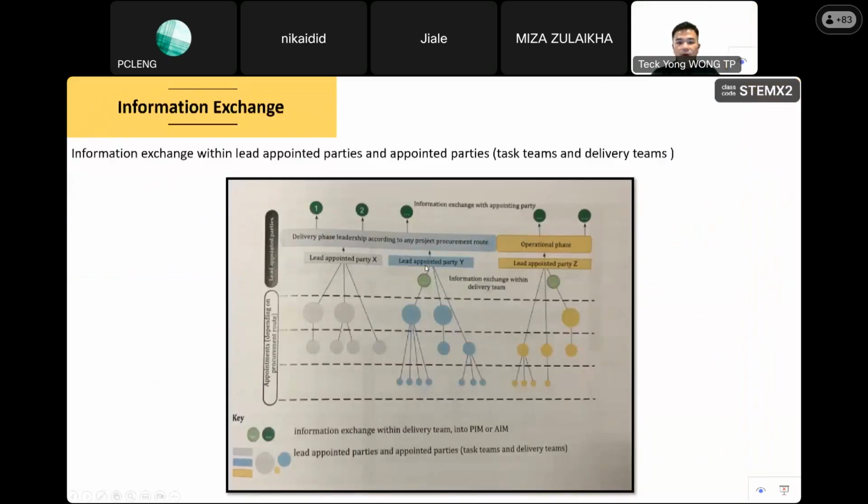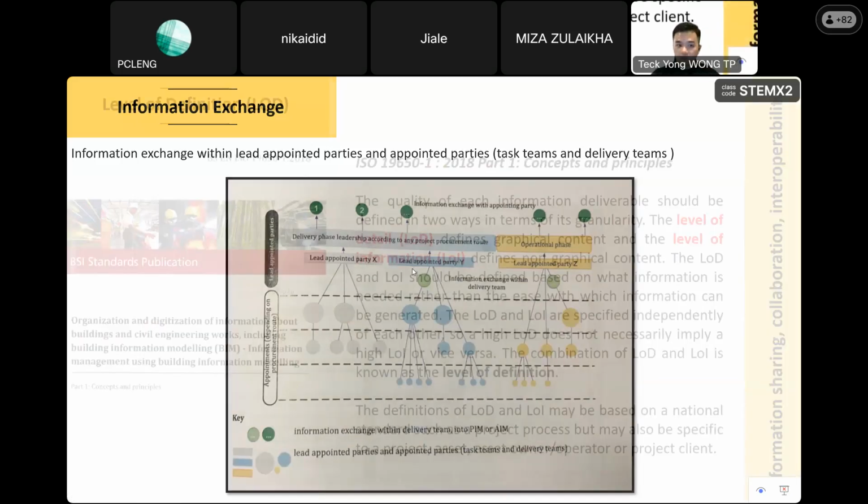So I have appointed already. So when something happens, I know who to find. I link to where. So the architect is under who? Who gets your money? Below the architect, who is there? Did the architect hire a landscape architect or not? If you hire the landscape architect, what should you write in your contract? You cannot say you are the employer to the landscape architect. So the landscape architect did something wrong. Is the client at fault, or the architect at fault, or the landscape architect at fault? We don't know who is taking care of who. So these terms will help us to solve this issue.